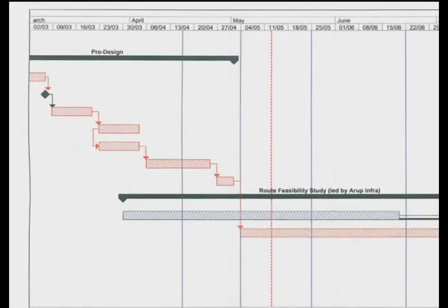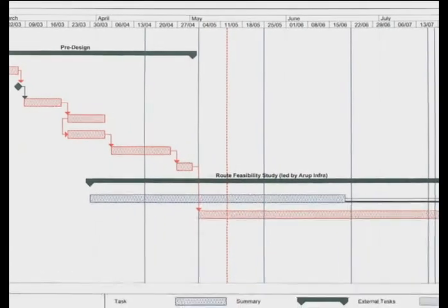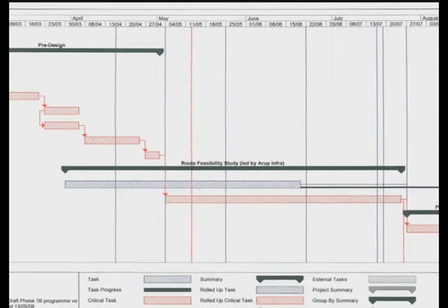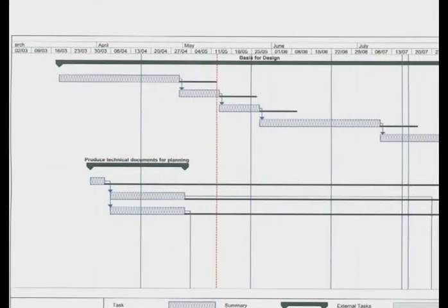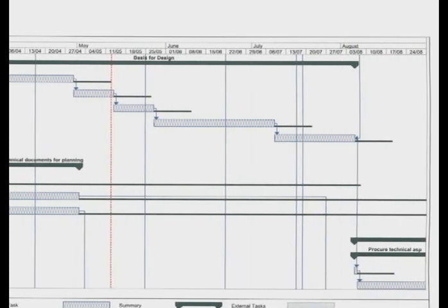Okay. Right, well, because I know that you've worked with the LDA on a number of projects, can you show us some of the complexity of the work that you look at rather than just a single house? Yeah, I can show you one example of a project we're currently running, approximately £30 million, and this is how we would show that at a monthly report. It's probably about 60 pages of activities. No one would read it. So what we actually do is show simply the critical path for this, which would fit on a much more comfortable 2 sides of A4. That gives us, as a management team, the opportunity to focus on the key activities. And of course, with 80 or 90 projects to review on a monthly basis, this is a very effective means of managing the key priorities on our projects.